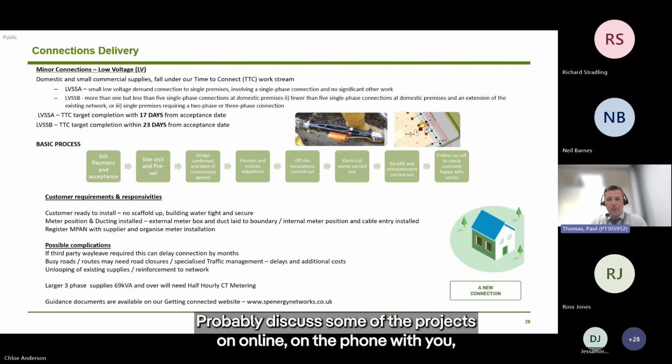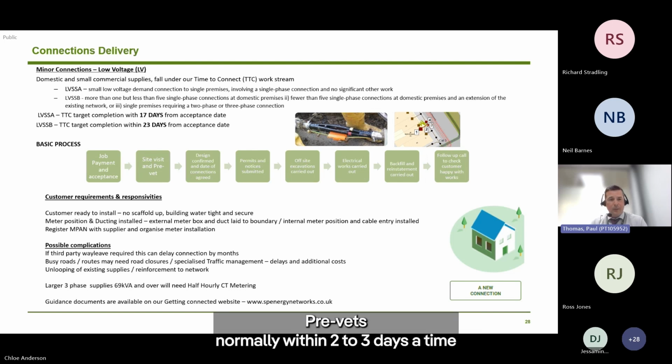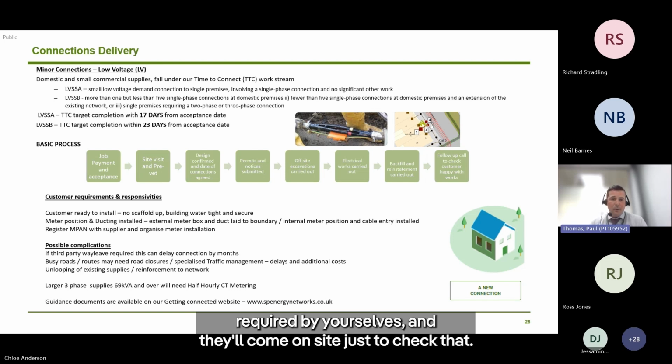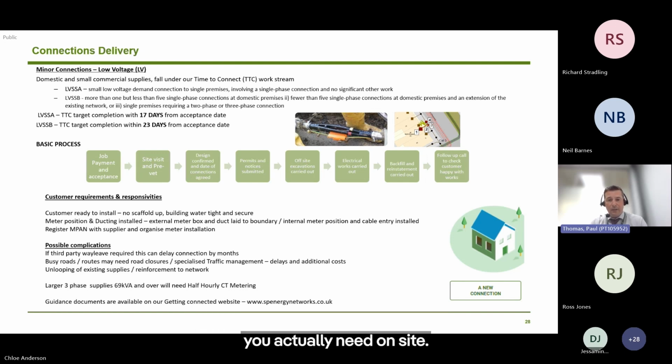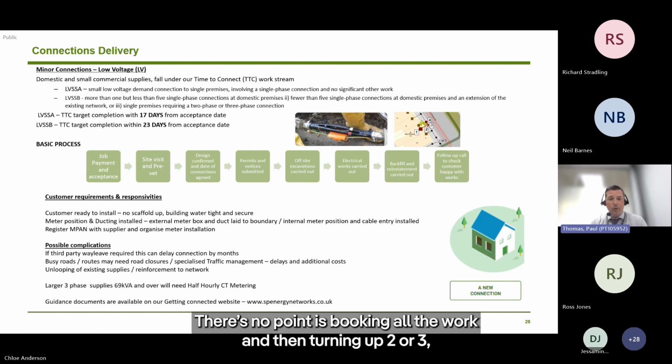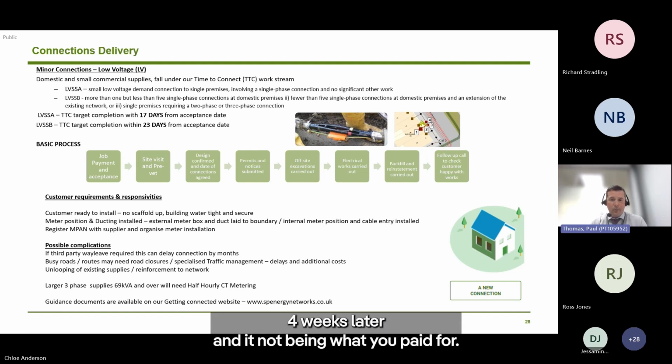I'll probably discuss some of the projects online on the phone with you, and then we'll book in a pre-vet. Pre-vet's normally within 2 to 3 days at a time required by yourselves, and then they'll come on site just to check that what you've said on your quotation actually aligns with what you actually need on site. There's no point us booking all the work in and turning up 2 or 3, 4 weeks later and it not being what you've paid for. So we'll look through it. If everything looks good, then we'll book it in and start looking at connection dates.